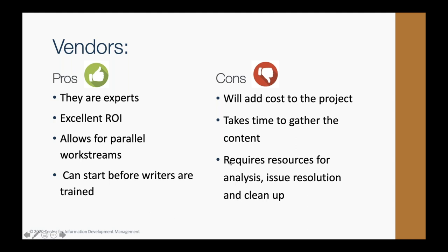On the downside, right, it will add some costs, not just time costs, to the project. It takes time to gather the content. I was really surprised at how long it took us to gather all of the disparate source content, especially if you don't have a CMS and you have a distributed writing environment. It may take longer than you think to literally gather up all the source content and put it into a directory in a OneDrive or FTP site or wherever is going to be the distribution point for how you're going to get that content to the vendor.